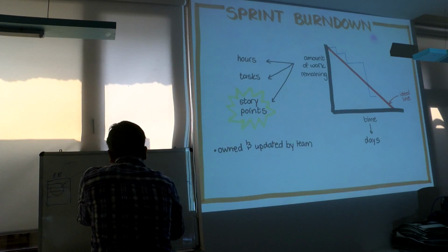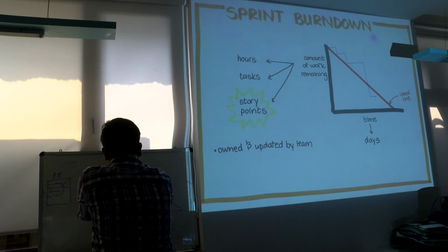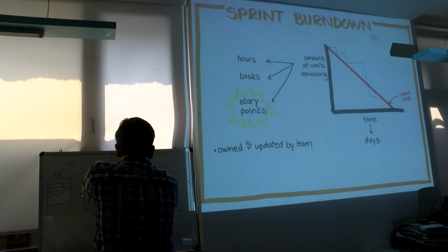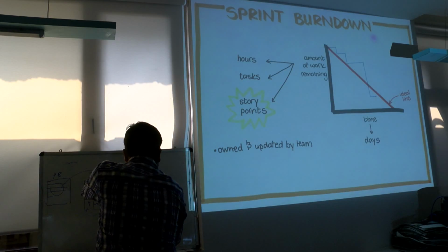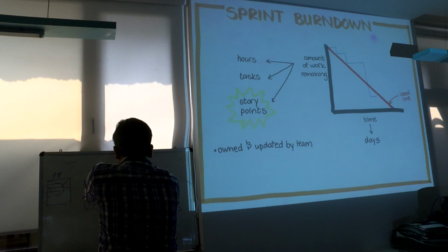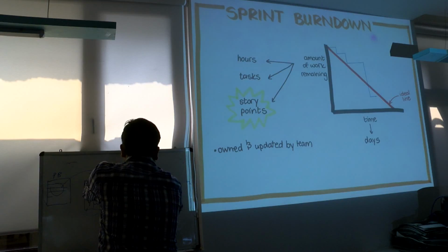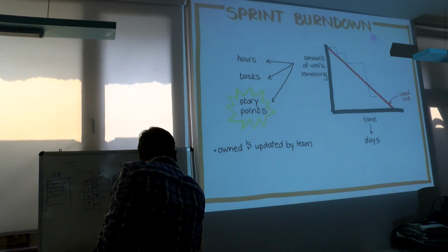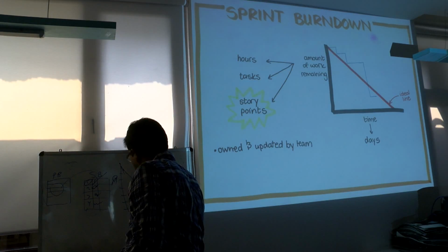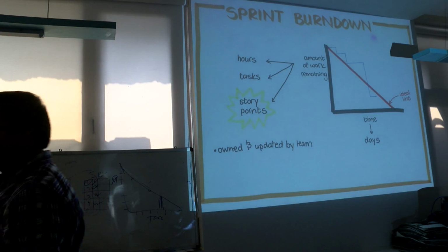Okay, say the amount is 7. So how much do we need to do? 7 tasks we need to do. So here is the day, day would be here, task would be here, like here 1, 2, 3, 4. So up to 3 days, with 3 days remaining, we can say 3 tasks are still remaining. This is a sprint burn down chart.